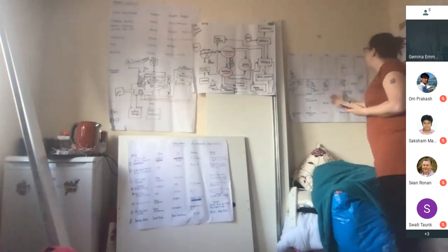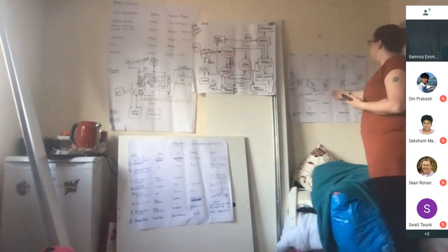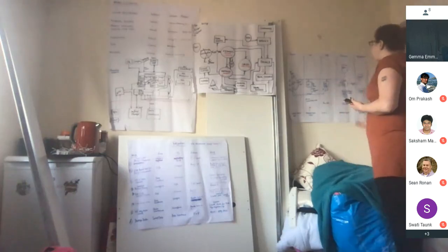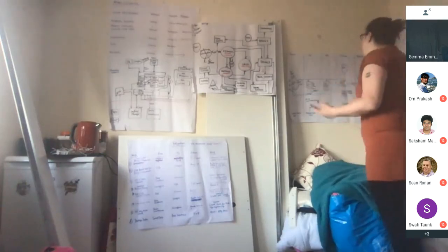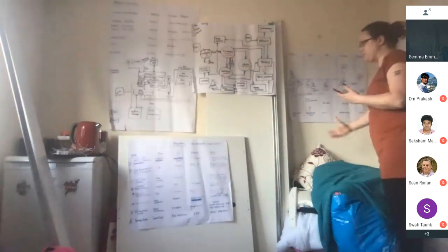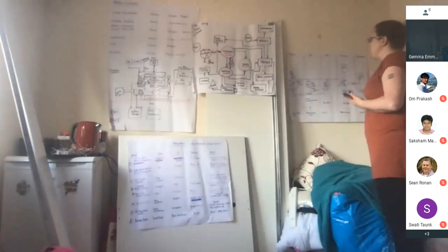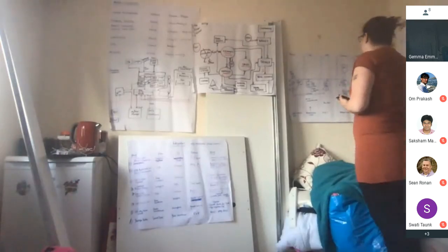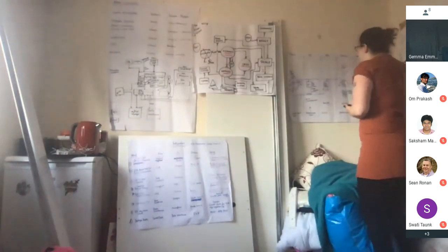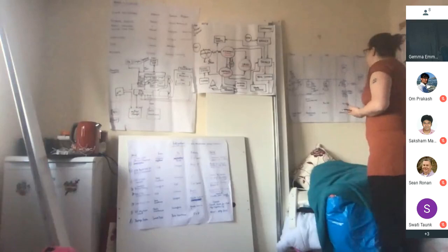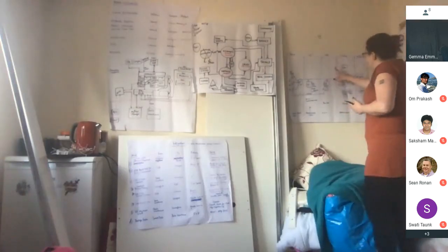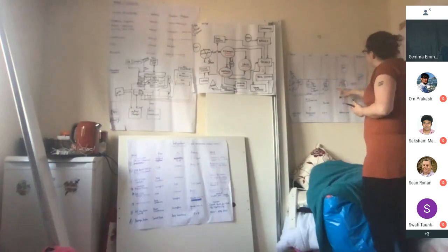At that point, we need sign off from the business. So once the business has signed off UAT, they could be testing one feature, they could be testing a whole system end to end. In this particular instance, because it's innovative and we're constantly developing, I want them to be testing things like the drug research features in isolation. So we'll do it not by epics but by stories, a collection of stories that come together to make a feature. So by the time we've signed off UAT, it's actually ready to